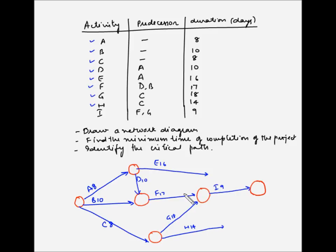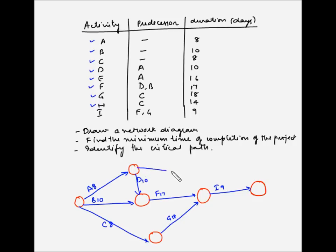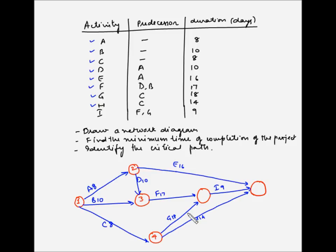Activities E and H will also end at the finish node because there is no activity dependent on these two. E takes 16 days and H takes 14 days going to the finish node. Now let us do the node numbering, which goes from left to right. We have completed step one: drawing the network diagram.